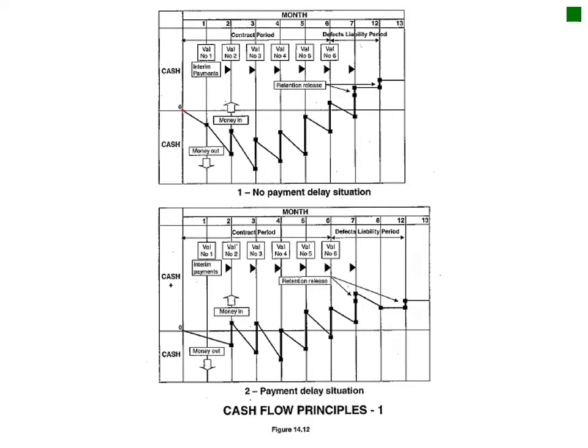Okay, here's that graph that we spoke of. So you can see you have your expenditure in the first month, you put in your claim, then you are doing more work, and you have more cash flow going out, and then you get your first payment. So your cash flow deficit is relieved slightly, but you still have cash flow outflow, and then you only get your inflow here. So you can see how the trend goes, and it's only after month 6 that you start getting a positive cash flow again, although it dips into deficit again after that month.